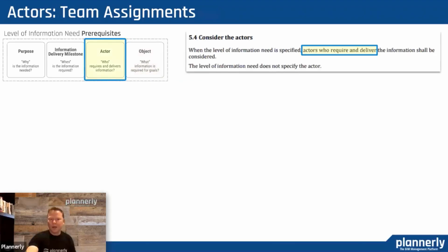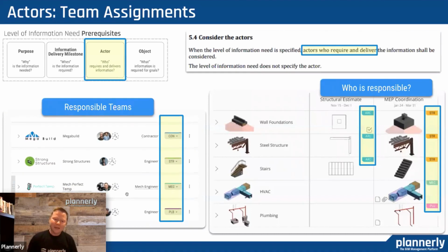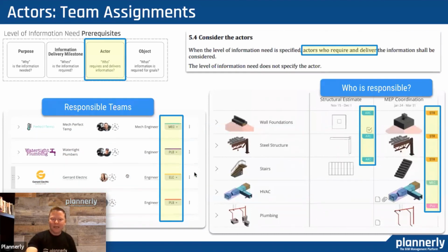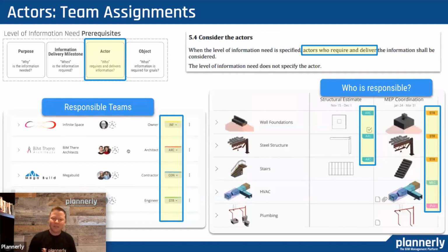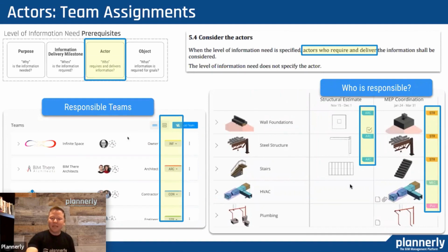We see a lot of documentation requirements now being added within the app. Yep. And then once we've defined the purpose, when it's going to be done, what that list of items are, who is going to be the person that is responsible for that? Whether it's somebody responsible for delivering it at a certain point in time, whether it's a team member on a team, being able to clearly define that and understand inside of the same place, even down to their contact details, so you can connect with that person inside of the same online environment, or pick up the phone and call them, organize a meeting if there is a handover potentially between one team and another team.